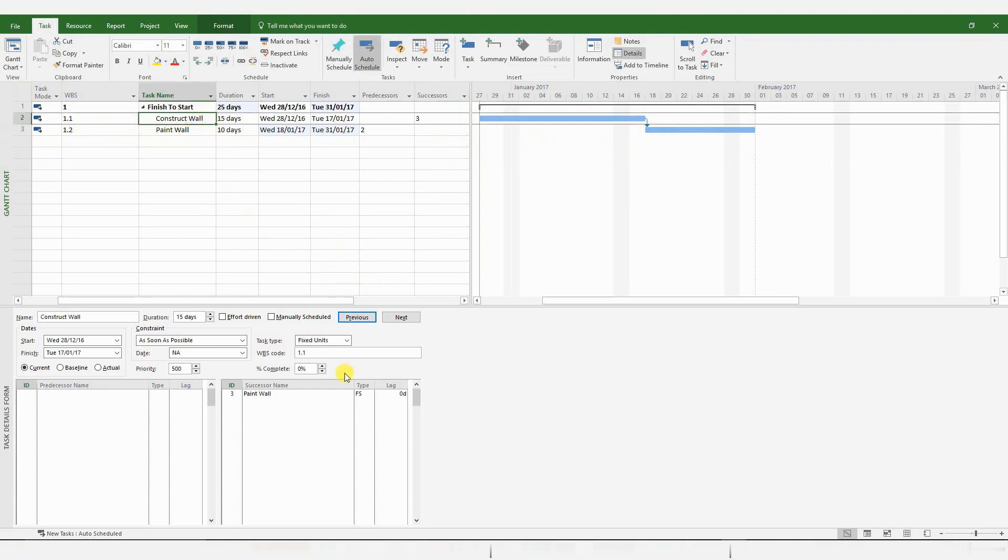Now, you can also give a lag to this relationship. A lag is a slight delay, which you could apply between activities. If you want to have a lag between these two activities, all you have to do is go to the Task menu, the Task pane.